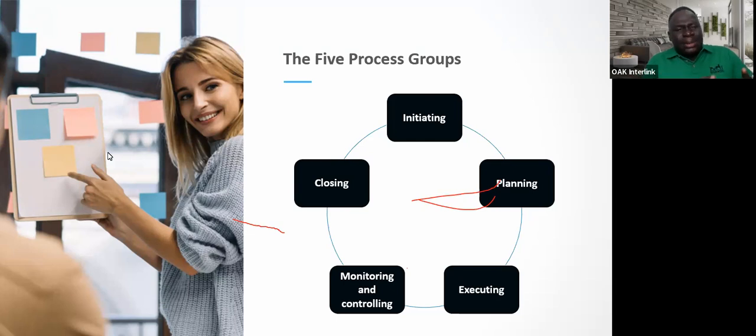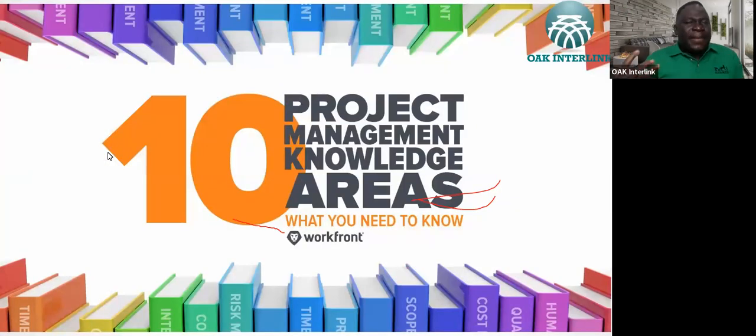Also, you want to terminate every contract you've entered into, whereby those contracts were carried out by vendors. But once the project is over, it's best to terminate all those contracts. Don't leave them open, so that they don't hold you to ransom, even in subsequent projects, with the same terms and conditions as in your previous projects. So you must ensure that all contracts are closed as the project is ending. Very important.